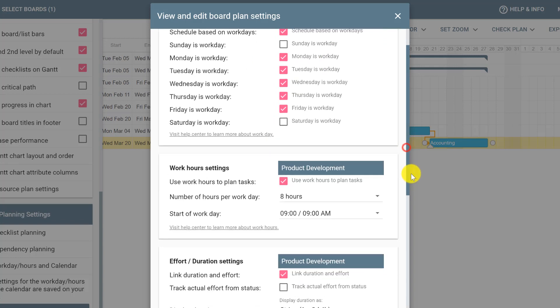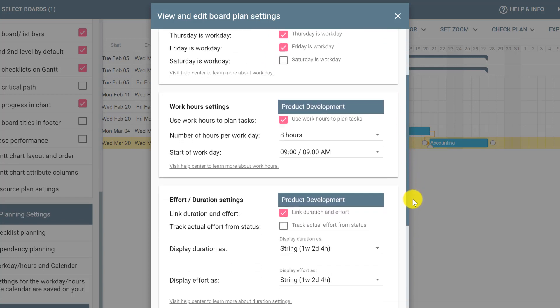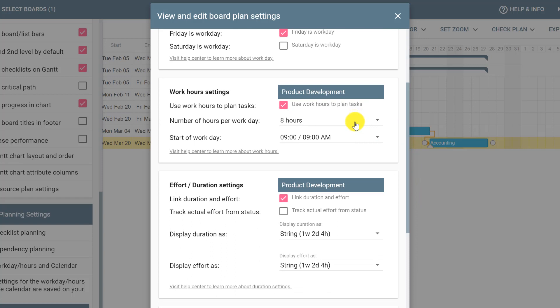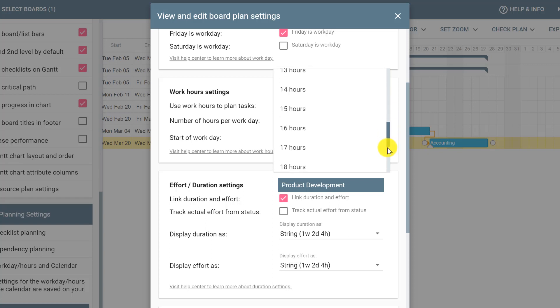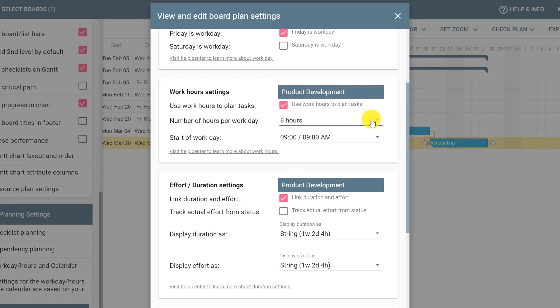You can also select the number of hours per work day. The default is 8 hours, but you can click and select any number from 1 to 23 hours. Notice that the start of the workday is set to 9 a.m., but you can also change this information.